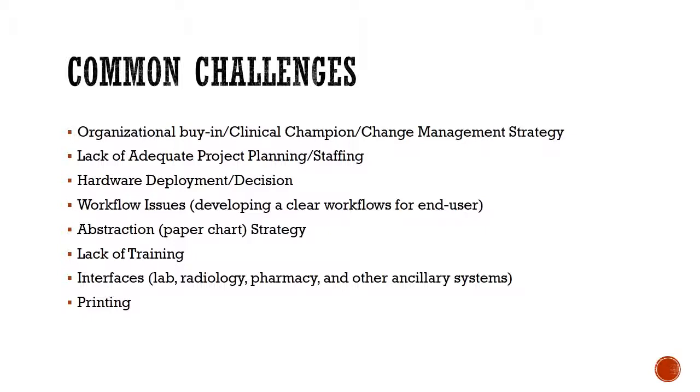One of the ways to mitigate this is to have a clinical champion, have a practice management champion, a super user of sorts, who will be able to provide support and be a thread of confidence for the team. It's important to define this change management strategy all throughout the project, and especially as you go live and start using the system, your staff should know what the escalation policies are and how to deal with issues that will definitely come up.